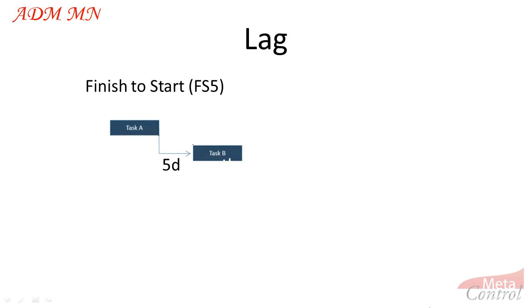The concept of lag refers to the existing delay between activities. For example, a 5-day lag in a finish-to-start relationship means that the successor starts 5 days after the predecessor has finished.